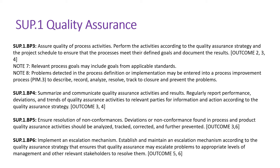BP4 talks about regularly reporting quality assurance activities and results — report performance deviations and trends of quality assurance activities to relevant parties for information and action, according to the quality assurance strategy. Once we have recorded the results, we have to see the performance deviations and analyze them — similar to metric analysis. We need to analyze the findings identified during audits, see where exactly the product is failing or where more issues are concentrated, look at the density of non-conformances, and try to strengthen that particular process inside your project.